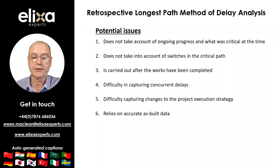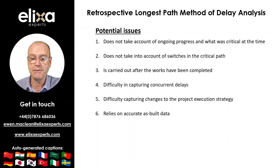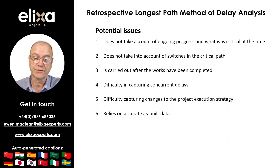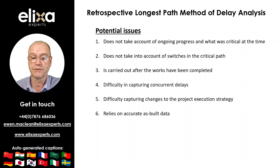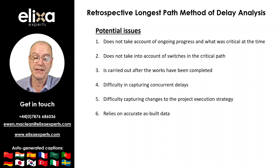The method also relies upon accurate as-built data recording when works were carried out, as flawed or incomplete program data can compromise the reliability of the delay analysis. This method may be considered where there might be insufficient program updates available, but if these records are not available, then assembling an as-built program in appropriate detail is still likely to be difficult, as well as complex and resource intensive.